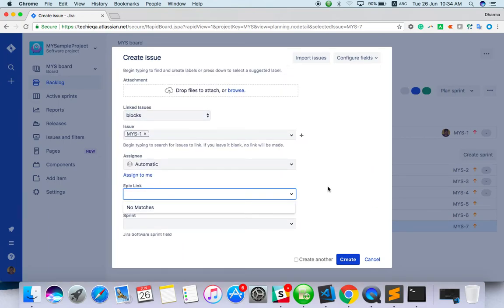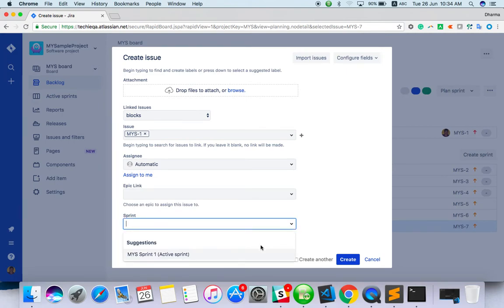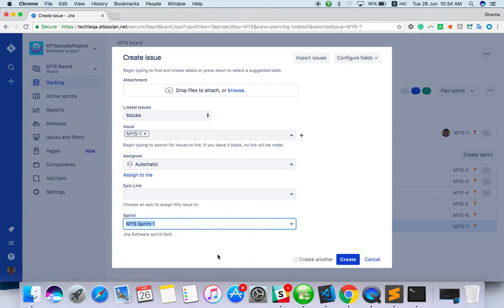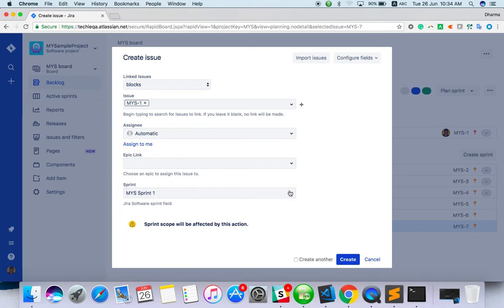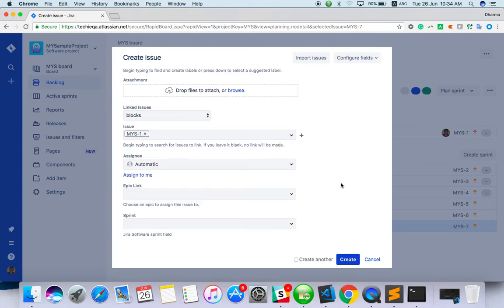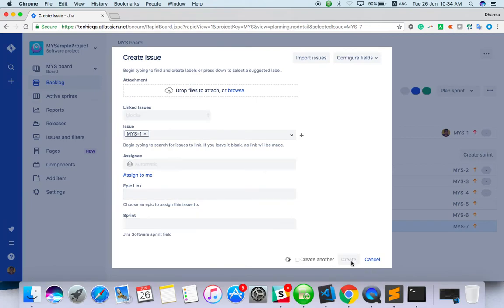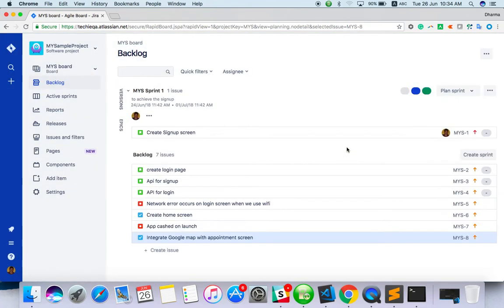Epic you can give. We haven't created any epic. And sprint, so there is current sprint is one. If you select one, you will get the message sprint scope will be affected, so you cannot add to current sprint. You can just remove it and create. So the task you have created: integrate Google map with appointment screen.